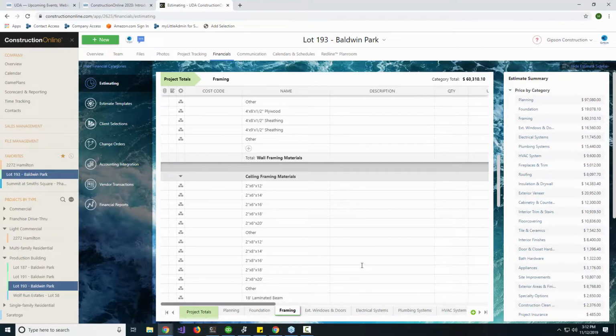Exactly. Usually, there are going to be sort of 2 phases that you're working with here. One would be the estimate creation, where we're really putting together the estimate, we're costing everything out. The rest is the construction of the project, where you're going to reference back to that estimate over and over again as a budget, as a reference when you're creating things like change orders. So you want it to be equally as useful in both of those cases.